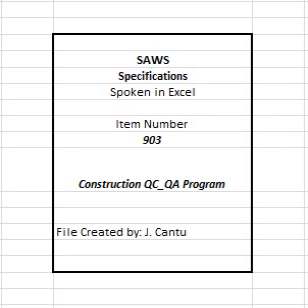A. Review contractor's proposed QC testing methodology, quantity of tests, and laboratory or contractor's equipment certifications contained in the QC plan. B. Review reports of QC tests performed and document corrective actions taken for any problem area. C. Verify QC testing by random and unannounced tests that repeat the contractor's QC tests.